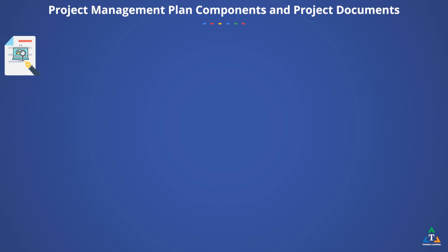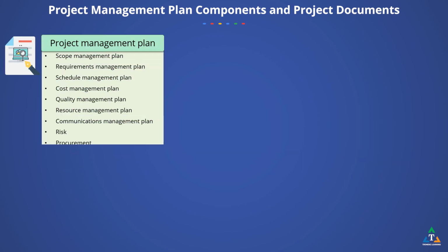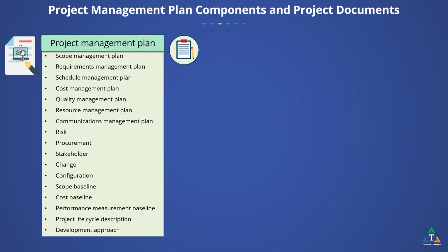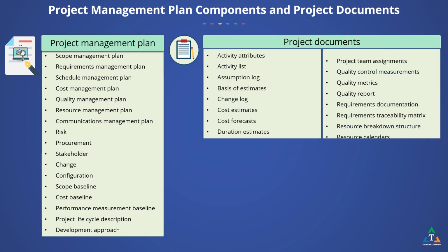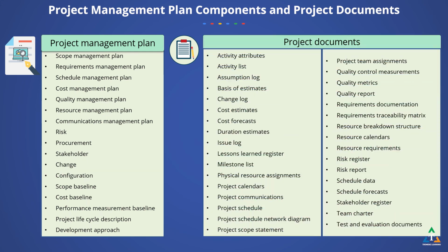Consider that the framework or a template for the project management plan is an input to the initial planning processes in each knowledge area. The template would have a placeholder for each subsidiary management plan, such as the scope management plan, schedule management plan, and so on. After these subsidiary management plans are created, they update the project management plan by being incorporated as part of the plan.